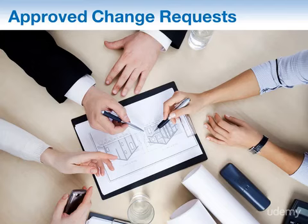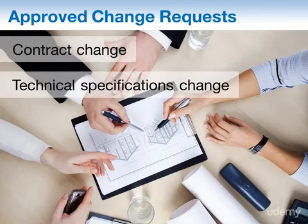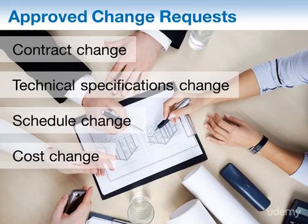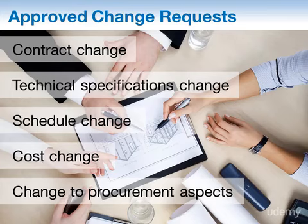Our final input is the approved change requests. These can touch pretty much anything in your relationship with the seller — a change to the contract, technical specifications, schedule, cost, or any aspect of the procurement. We need the approved change requests as inputs so that we know about them and can control their correct implementation and execution. It would be detrimental if we had a schedule change on our contract and nobody knew about it. And with that, we have come to the end of Part 1 of Control Procurements. See you in Part 2. Toodaloo!